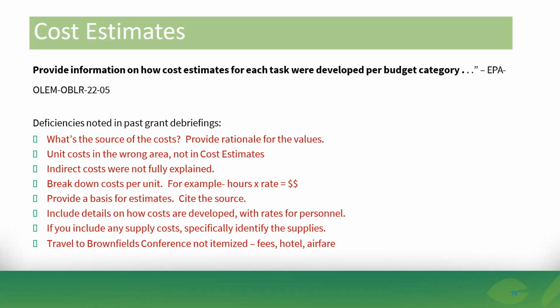Yeah, we're more than happy to, if you have questions about typical costs for these types of items, we can try to collaborate on that. Just offhand, typically in our program, we typically see $3,000 to $6,000 for a phase one. An ASTM standard is probably the lower end. And then if you add the VAP component to that phase one, they typically run a little bit higher. But note at a minimum, all the phase ones have to meet the ASTM standard.